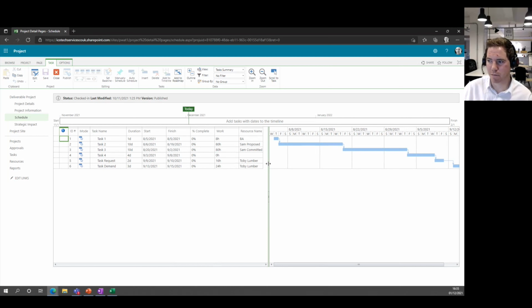So you're saying, how does this project contribute to your objective 1, which might be to reduce operational expenditure? How does this project contribute to another strategic objective? And then you can weight those answers and come up with a numerical score for your project, which is all part of the prioritization engine in this technology.